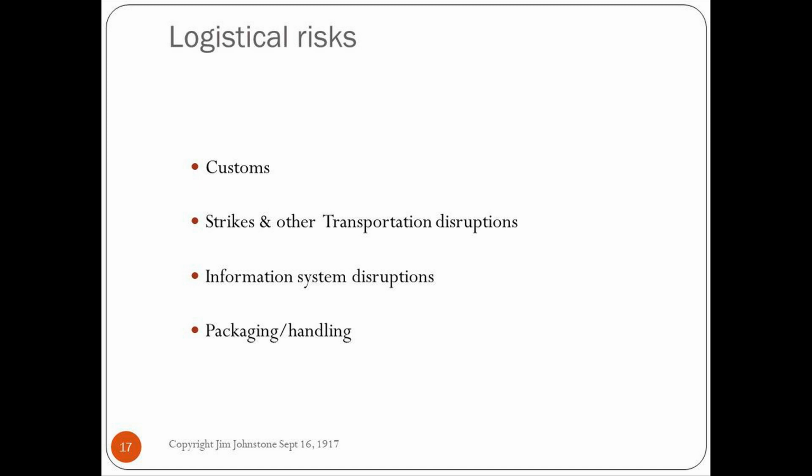No problem, you say, I'm shipping by air. Well, a lot of times air cargo sits on the tarmac waiting to be loaded. And while it's sitting there, it gets rained on, gets moved around, can be pilfered. So you do have a loss risk factor at the airport. Also, product can get bumped off of airplanes. Some customers pay for priority shipping, which means they get to go first. They need to go, they go, your freight sits. So be careful on mode of transportation. Be careful by having suppliers that are far away with long pipelines into you.